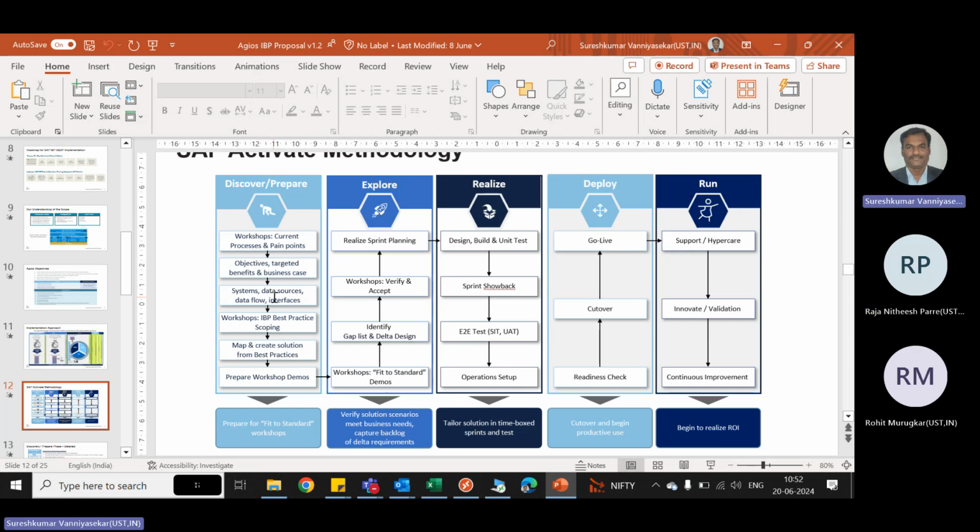So as per the schedule, at the beginning itself we would plan 3 to 5 meetings, or 1 week, 2 weeks, per day 2 hours. We have to be well prepared, because we have to utilize these meetings to get as much information as possible. So we have to do all the groundwork. If possible, we can ask for the business blueprint of the current tool well in advance. We can go through it and try to understand it without them, so that if you don't understand something, you can note it down as open points and then ask them during the meeting.